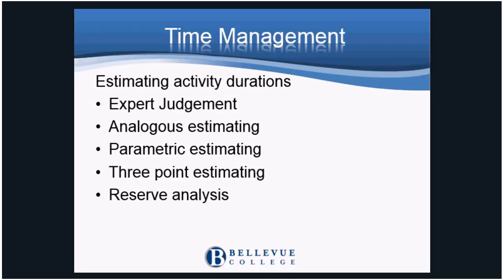Some managers may add a little extra time to the estimates for some extra cushion. What happens is if enough subject matter experts or managers pad their individual time, the overall estimate becomes inflated and the schedule becomes inaccurate. It is crucial to stress the importance of using realistic times to estimate activity.